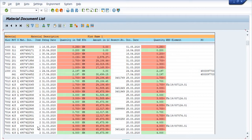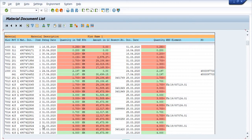We issued material of 4 kilometers from the SLOC to WBS using movement type 415, against this document number. Then the issue of material from WBS to network, issued against reservation using movement type 281Q, against this document number on 31st March 2020. Transfer posting uses movement type 415.